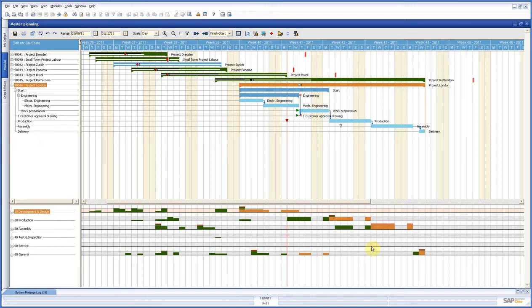Now, if we see this, how can you solve problems in this case? First of all, you can say I do nothing. I know I have some buffer in my company and it's not too much, I can do it. That's fine. The second solution you can use is that you get in more people in a certain time, and then the system says fine, then you can do that as well. Or, and that's what's needed in this case, you have to move around.